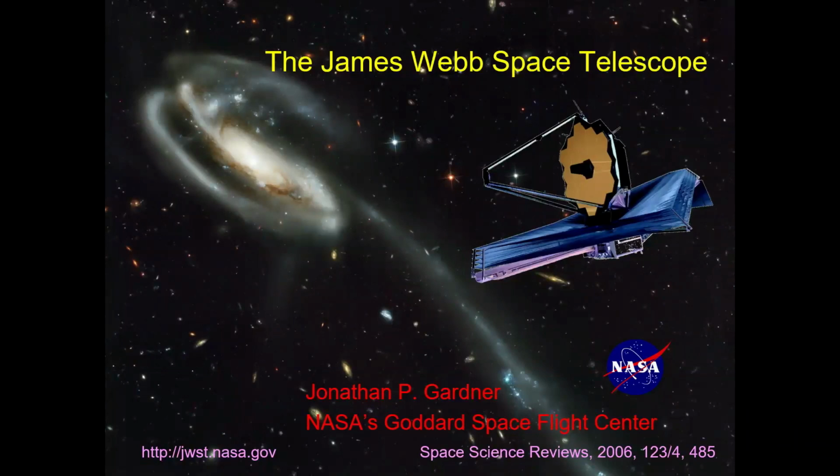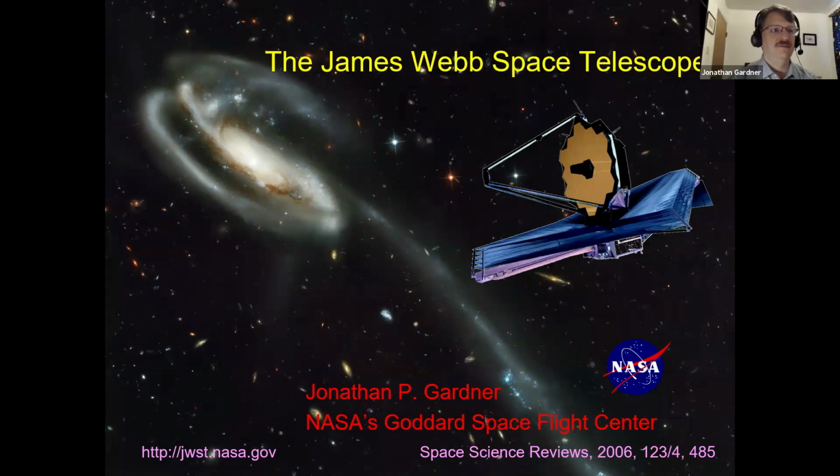All righty, we have time for one more question from, I don't want to say your name incorrectly. So how long does it take for the vacuum chamber to reach the operational vacuum for the JWST? And what is the spectral resolution of the spectroscopy? Okay, so the vacuum test, the big chamber in Houston took about a month to get to its operating temperature. It takes a lot longer to cool down to operating temperature than it actually takes to pump the air out and make it a vacuum. So the big delay, it took about a month to cool down to the operating temperature.